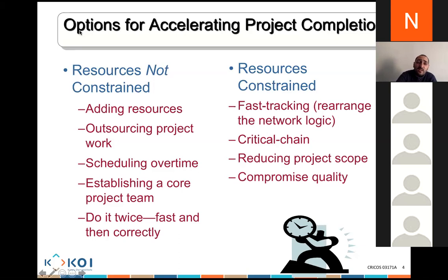The critical chain is something you work on after you create the critical path. Why? Because the critical path a lot of the time doesn't consider the resources. So what the critical chain does is say, all right, let me consider how many resources I need to be able to get this project delivered on time. If they look at the critical path and see we don't have enough resources, they might allocate the resources to various tasks and see how long the project needs to complete, which will likely increase the duration of the project. What they also do is find the activities that are interlinked.